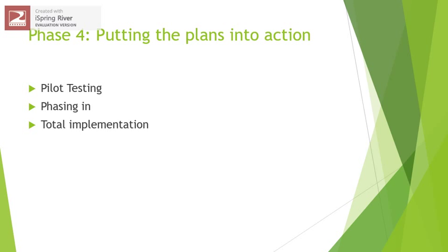First, let's focus on pilot testing. Pilot testing is very important because it allows planners to identify and work out any mistakes of the program before it is offered to a priority population. Pilot testing of a program should be performed on similar individuals and settings compared to the actual priority population and setting to get true results. If the pilot test does not use a similar population or setting, then problems within the program specific to the actual priority population will not be identified. After pilot testing a program, it is necessary to have program participants rate various aspects of the program so it can be revised, with feedback on how to revise program aspects.